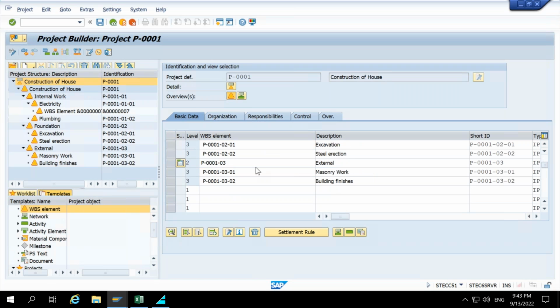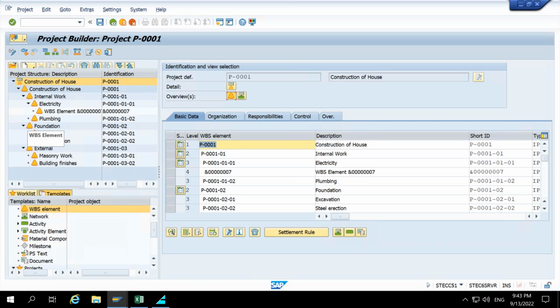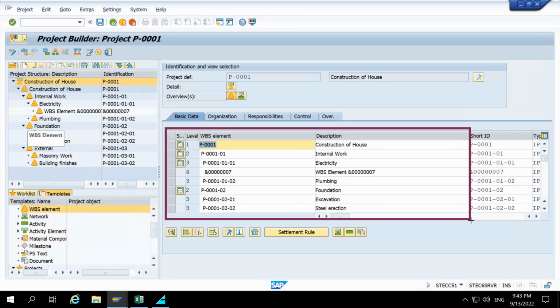In this screen you can paste the content from Excel. So let's say if you prepare Excel, you can copy paste from there. It depends: if you have 3 WBS elements, then definitely the first option is better. But if you have multiple WBS elements, then we can also consider the third option, where you just prepare an Excel sheet and copy paste it from the Excel sheet.